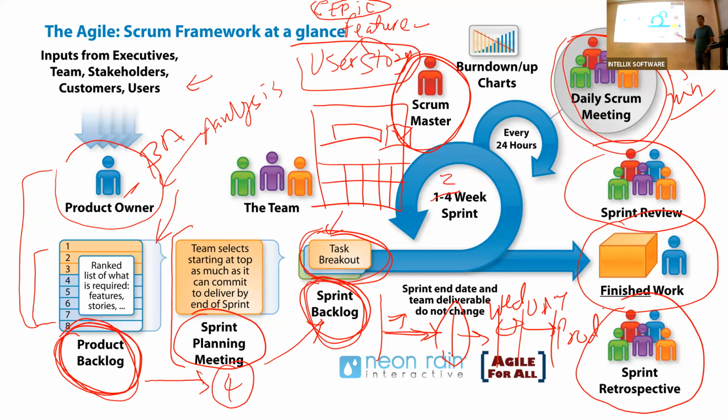It also happens on Fridays, the last day. Sprint reviews generally happen 1 day before so that they can get the feedback, document the stories, and put them in the backlog. But this happens on the last day of the sprint.